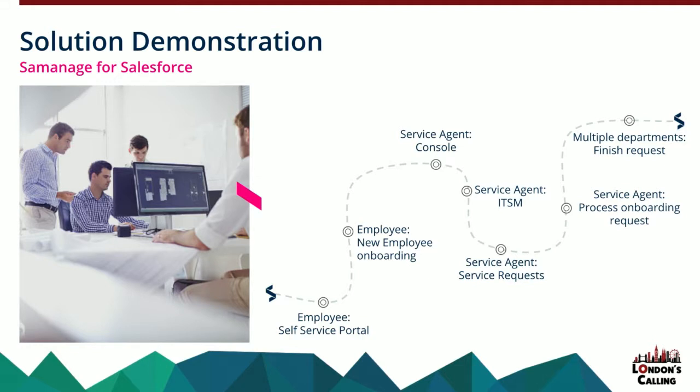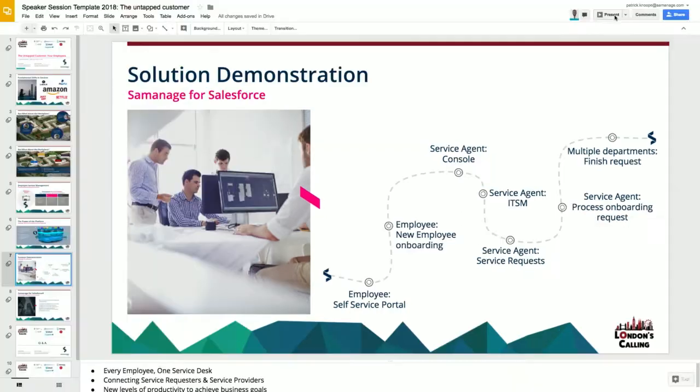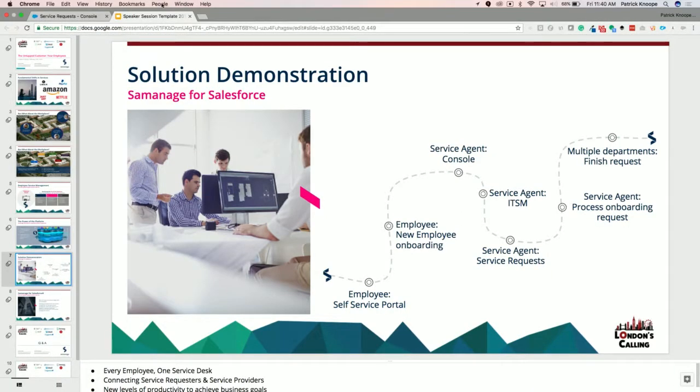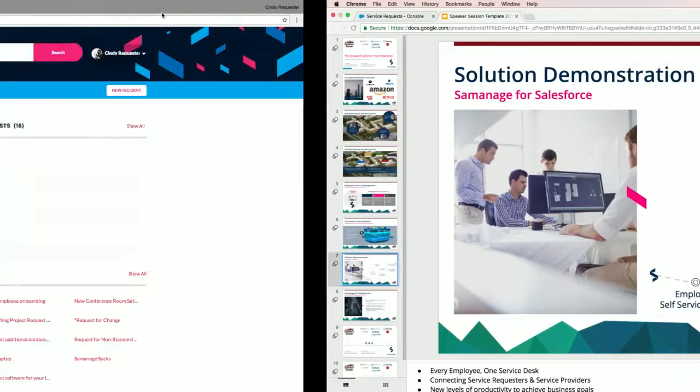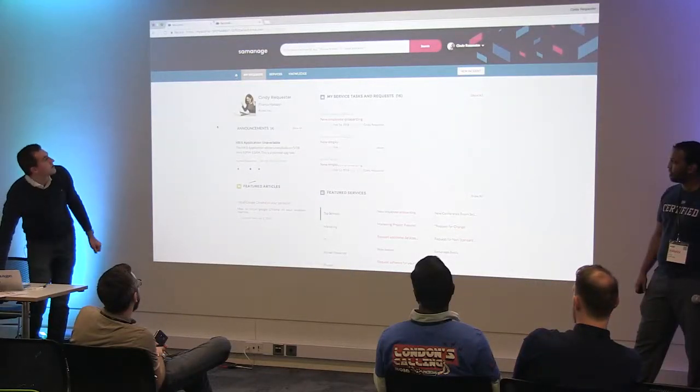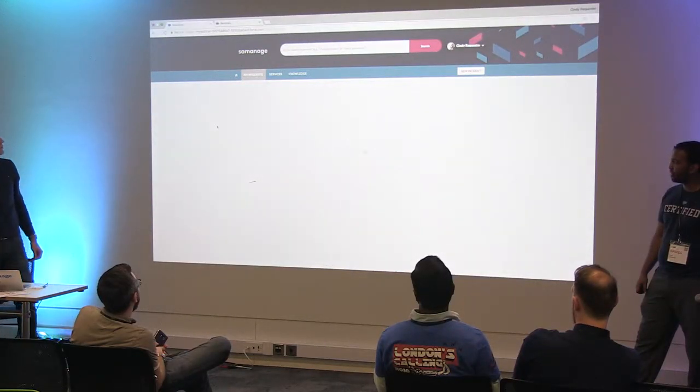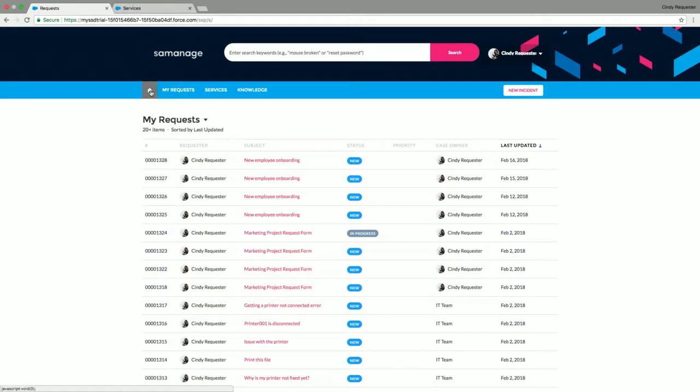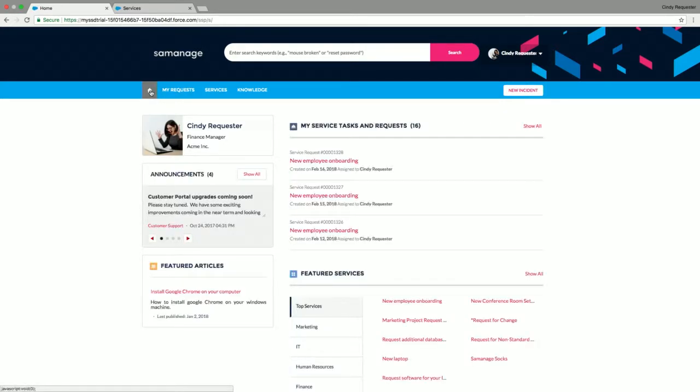In my experience, there are two general approaches for any migration project, but it applies here more so. There's the big bang approach. Depending on the size and complexity of your org, the big bang approach might be a favorite. In this approach, you take all of the customization, custom apps, and all of your users and move them all to Lightning in one go. It works well for small orgs. It's a potentially high impact approach which requires a massive effort, and it will disrupt your users' workflow.